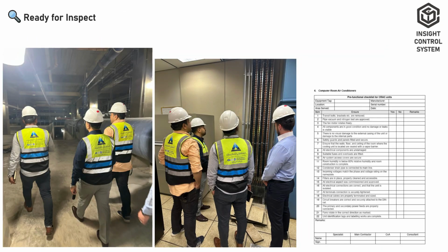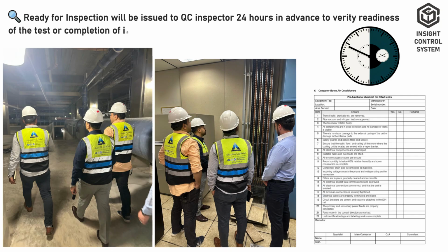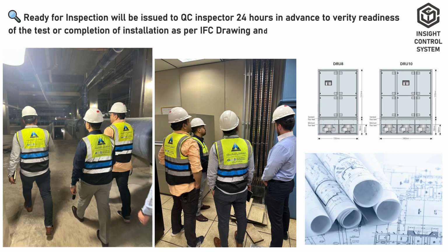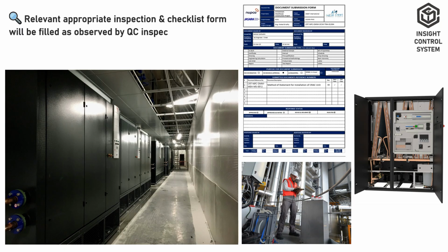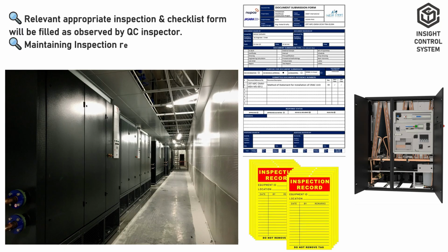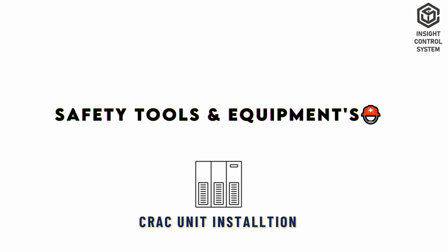Request for inspection will be issued to the QC inspector 24 hours in advance to verify readiness of the test or completion of installation as per IFC drawing and standard. The relevant appropriate inspection checklist form will be filled as observed by the QC inspector. Maintaining inspection record.